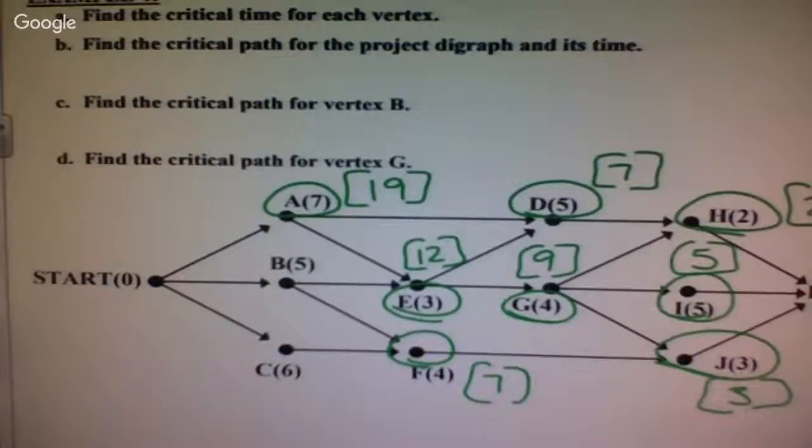Okay? You took the bigger number backwards to B. I don't know if it was because it's like a straight across shot that y'all are going for that one. E goes backwards to B and gives me 17. And the only way to get backwards to C is to go from F, so that gives me 13.